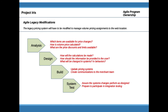Our legacy system is very complex, and we've decided to use a more traditional waterfall approach to making changes to it. We'll be doing analysis to determine which items are available for price changes, how the volume price changes should be calculated, and what the discount limits are. In design, we'll look at how calculations will be made, how information should be provided to the user in their decision-making process, and what changes will impact other systems. We'll have to build the updates into the pricing systems and create communications to the merchant team for them to understand what we're doing and why. System testing will assure that the changes we've made work and that we're prepared to participate in integration testing.